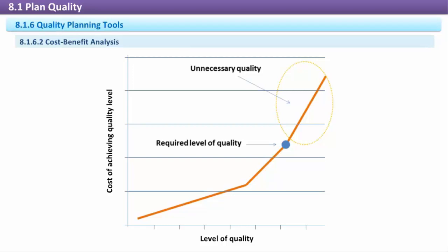The goal of meeting the quality requirements is to reduce costs through less rework and higher productivity, but there are costs associated with meeting the quality requirements, and what we want to find is the agreeable level between quality requirements and the costs associated with meeting those requirements. And just as we avoided gold-plating the scope, we likewise want to avoid gold-plating the quality requirements. Exceeding the customer's quality requirements results in quality costs incurred by the project that provide no real benefit to the